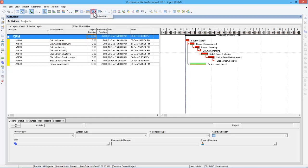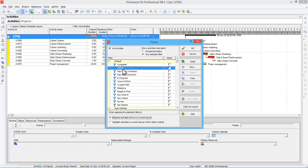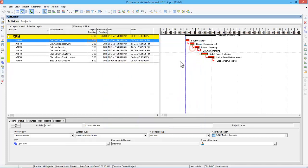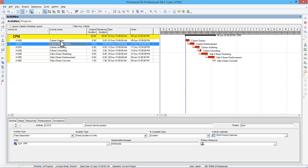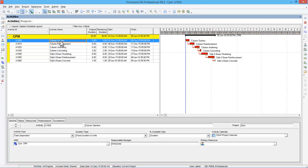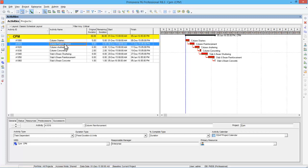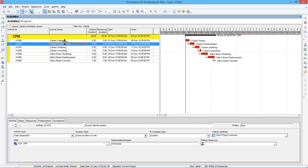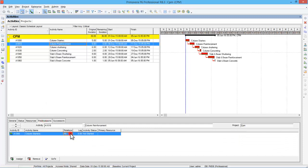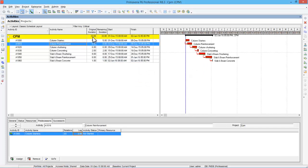For fast tracking in Primavera, first filter all critical activities: go to Filter, select critical activities, and click Apply. The program will show all critical activities. Look into these activities and identify which can be done in parallel. Column reinforcement starts after column starters, but since there are several starter columns on site, you don't need to wait for all starters to finish. After two days of column starters, you can start column reinforcement. Go to column reinforcement, go to Relationships, change the relationship to Start-to-Start, and give a lag of two days. After scheduling, the duration changes from 36 days to 33 days.